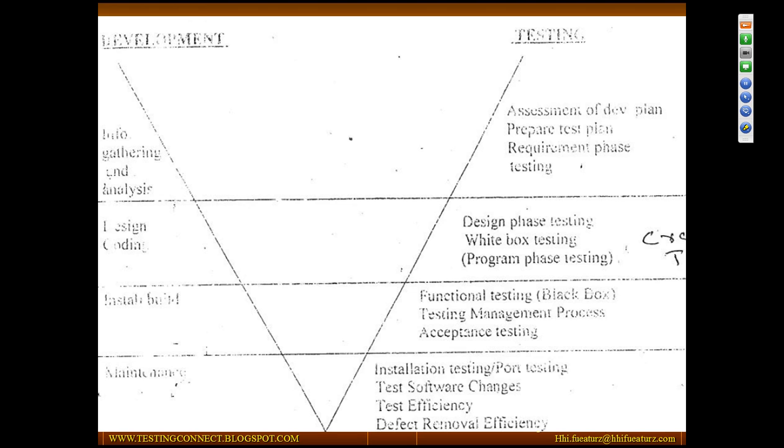Then developers and testers also get involved in the analysis phase. So what will the development team and testers be doing? The development team will come up with their development activities plan. Who will be doing what, which requirements you have, how exactly you are going to develop those requirements, who will take care of what, and how much time it will require for developing the entire application. By considering all these factors, they will come up with a development plan.